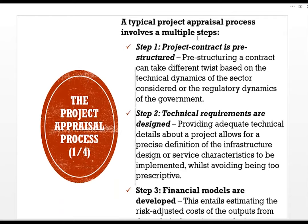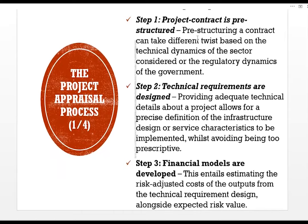Step one: the project contract is restructured. Restructuring a contract can take different forms based on the technical dynamics of the sector considered or the regulatory dynamics of the government. Step two: technical requirements are designed — providing adequate technical details about a project allows for a precise definition of the infrastructure design or service characteristics to be implemented, whilst avoiding being too prescriptive. Step three: financial models are developed, entailing estimating the risk-adjusted costs of the outputs from the technical requirement design, alongside expected risk value.